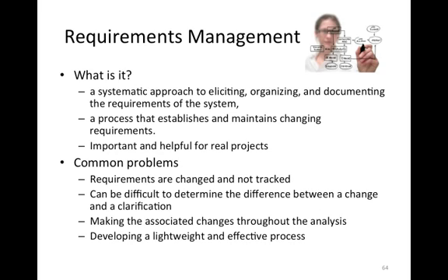And when something changes in a requirement, there is a ripple effect through the entire project. So if I am changing how we are calculating the due date for a bill, I may need different data for that. That may require a change to the data model. It may require a change to the text in the bills. It may require different parameters for how we send out bills. I mean, it can have a very big effect. One small change can have a really big effect.